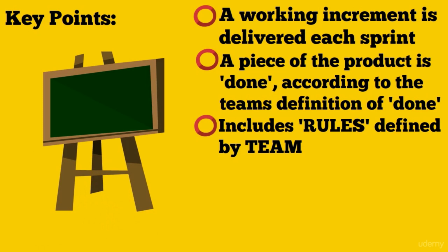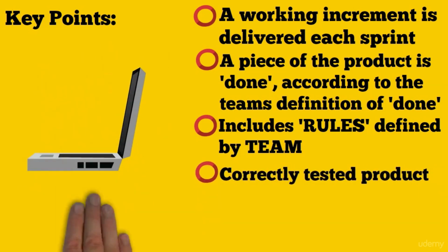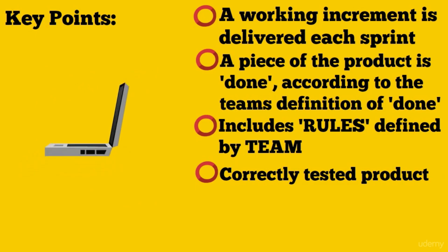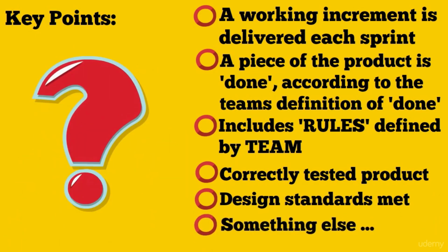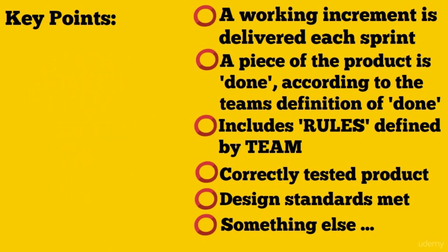As I've said before, there are many ways to come up with a definition of done. It may be that a tester needs to ensure that the product is correctly tested and declared as a high quality product before it's done. The designers being happy that it meets all of their design standards might be another rule in a definition of done. And basically putting together this list of things that you will adhere to and work towards and can adapt as the list goes on is really key. So I wanted to draw your attention to that.